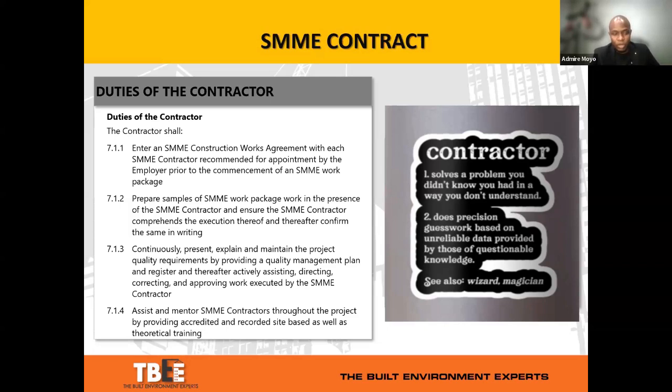And one of those methods as well, according to 7.1.3, is to continuously present, explain, and maintain the project quality requirements by providing a quality management plan and register, and thereafter actively assisting, directing, correcting, and approving work executed by the SMME contractor.